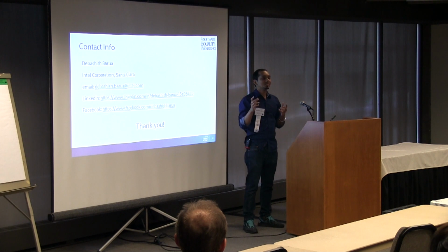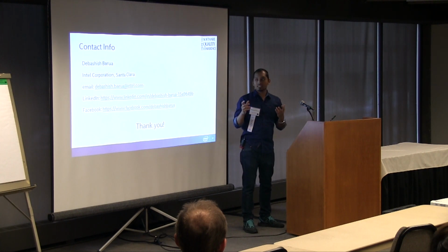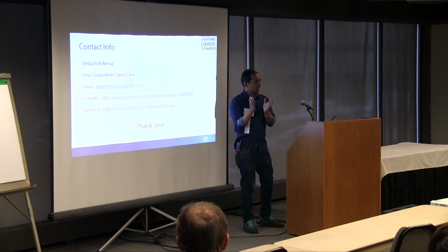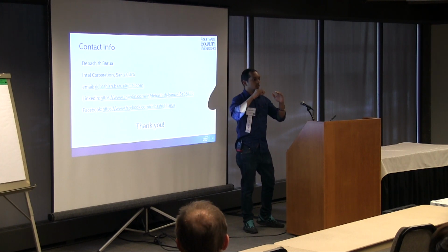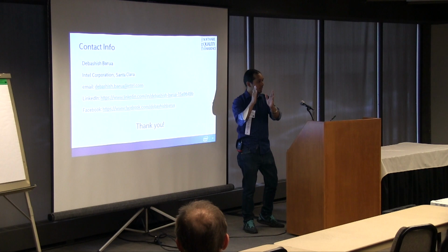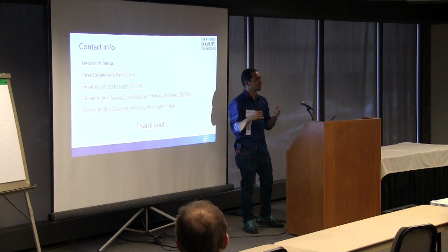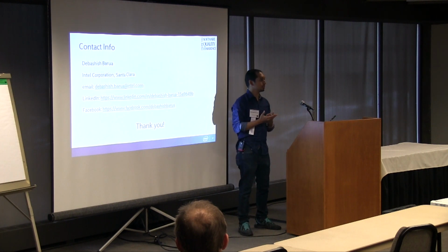Since we are taking cumulative trends, when you take a Rayleigh function, at the time when you hit the beta mark or something, when there is a lot of validation going on, you see a lot of peak. That is where you see a lot of defects. So yes, we did try out Rayleigh and other models as well, but we found the sigmoidal to be the best fit, because you cannot go wrong with this.